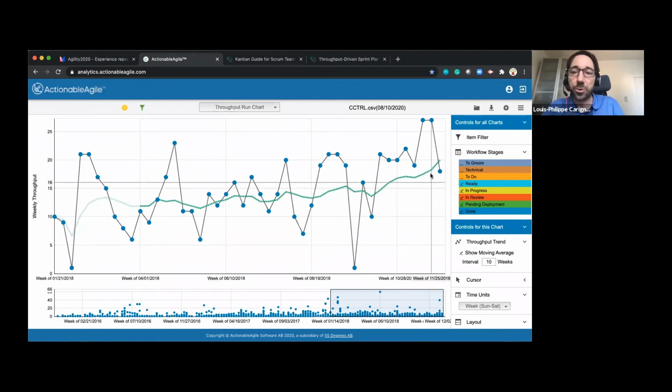So for the next sprint, and they're doing a one-week sprint, people would ask me, how many items would we take in the sprint backlog? Well, we could say we're going to take 20. Now your question, sir, is, for a release, which is maybe 1 quarter ahead, how will I do this? Because it might still change. That throughput is going to change maybe. And so we just don't want to take one reading.